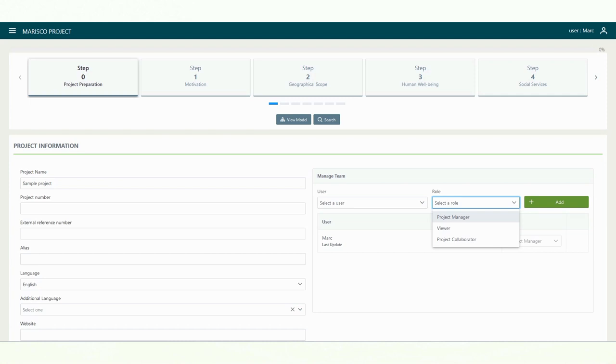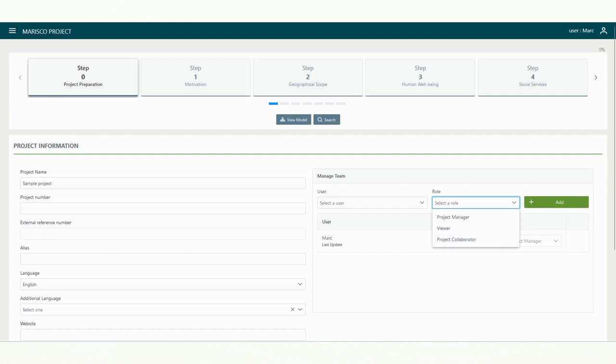Project managers have unlimited user rights. Observers can view your project but cannot make changes to it. Project team members have limited user rights. They can make changes but cannot make major decisions, such as deleting the project.